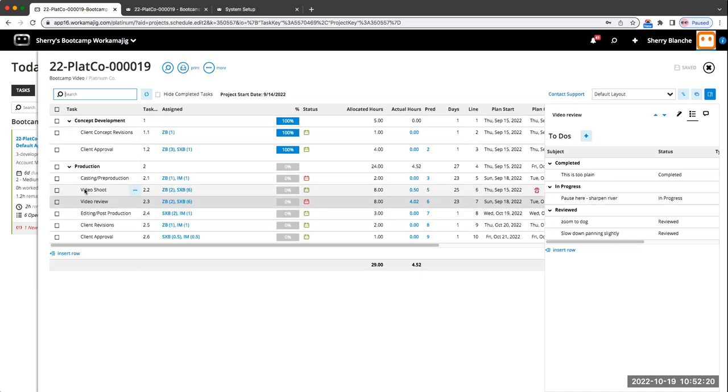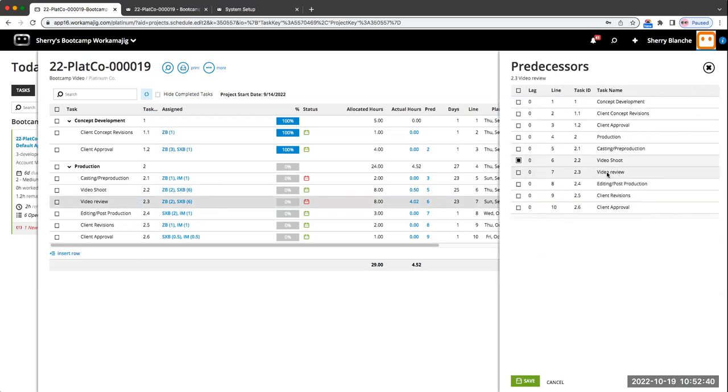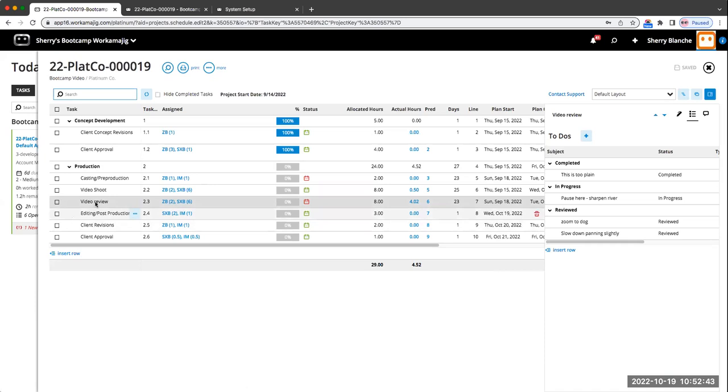So let's say you have a schedule that is simply create, review, get approval. A schedule can be that simple. Your review is going to be where all the hours go. That's fine. Your hours are here. It's still in just review or create or whatever it is. Client review, internal review. I've seen these be very simple. I have internal review, I have client review. And then I finalize, and then we have an edit task, and then we have an approve task. And everything just goes into that detailed. But